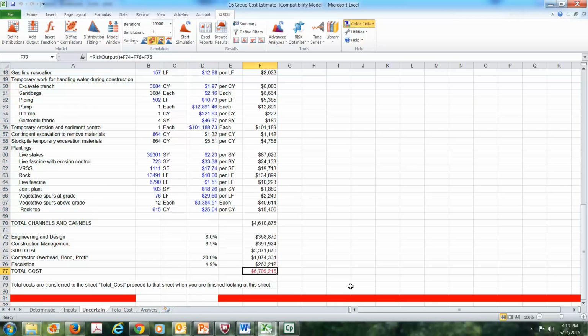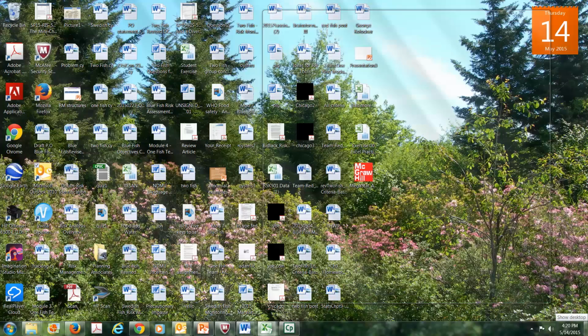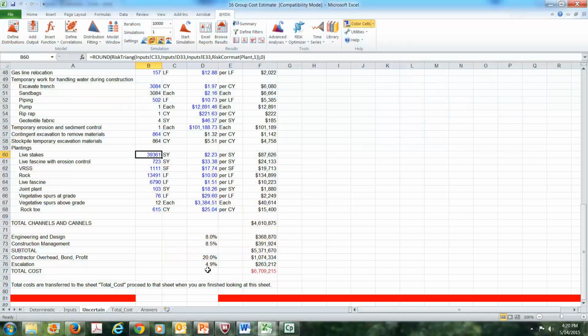What Walla Walla does is they take the best cost estimate, and that's done the old style. Go to M. Casey's M2 and come up with the best estimate of the quantity and the best estimate of the cost. And so they come up with a baseline cost estimate. And then they would look at variations from that. But let's see how this works and what we can do with it.